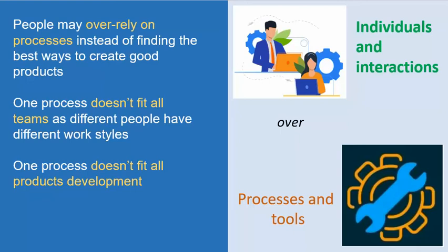It's not only that. If your team is located across geographies, you can bring in a proxy product owner, and location-independent agile can be implemented, wherein we can have multiple product owners. This doesn't go well with the process wherein we say there should be a single product owner who makes decisions for the product, owns the backlog, and owns the priorities. Yes, we are adopting it, but we have customized it a little bit. If the product owner is not available, or the team is split across multiple geographies, have a proxy product owner to answer their queries.